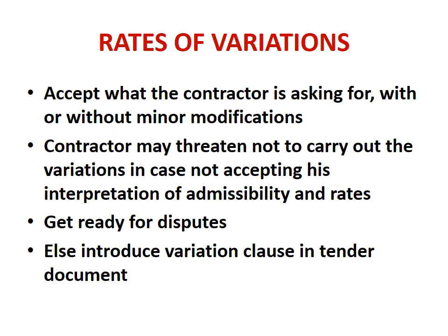Then the problem is that the contractor may threaten not to carry out variations in case we do not accept his interpretation of admissibility and rate, both. Suppose the project manager feels that this variation is not admissible and should be done as a part of the contract, and the item is included. But then the EPC contractor may take a stand that no, this is not included, I will not carry out this work, this item. So in such a case, interpretation or admissibility is also questioned.